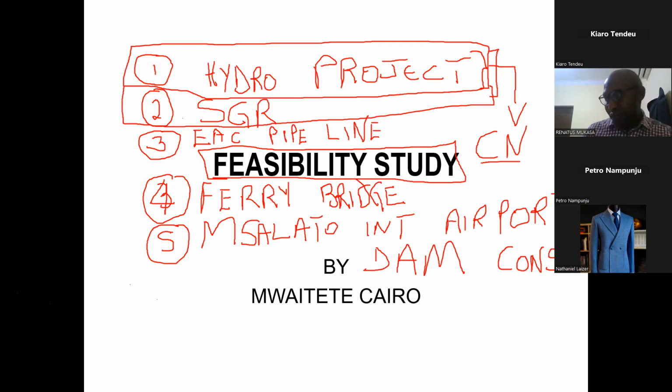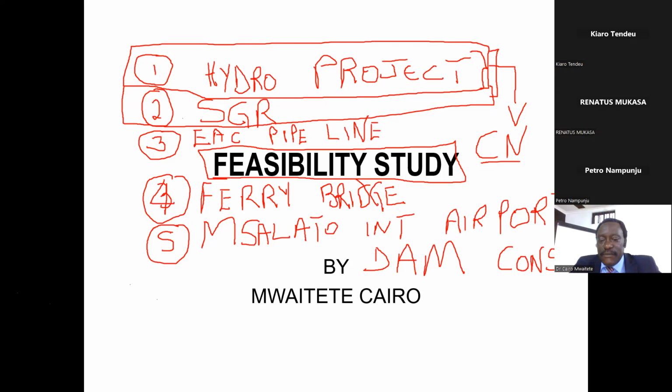Thank you. Very good. In terms of cost, you will take the market price, but you'll get it from the field, not from books. That's very important, because we want the manager to go to the field and ask what is happening. Then you will make assumptions. All managers work under assumptions, because an estimate is based on the assumptions you have to make at the end of the day. So you can make contingency for any unforeseen events in your plans. It's a very important consideration.